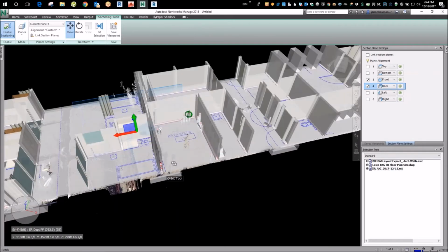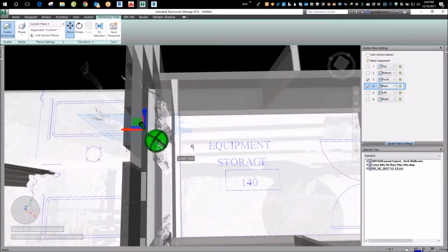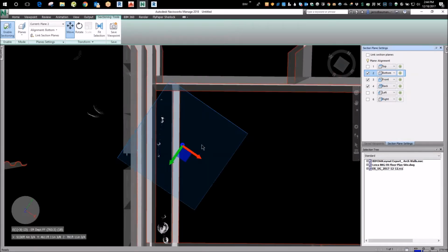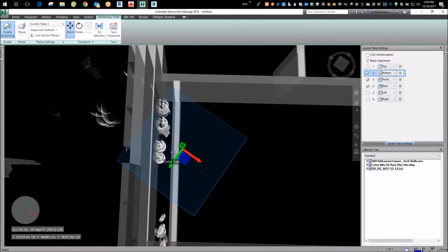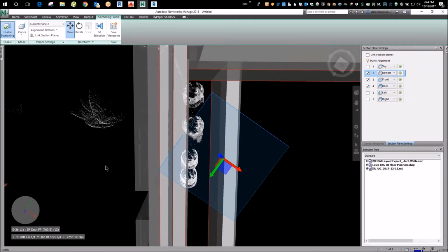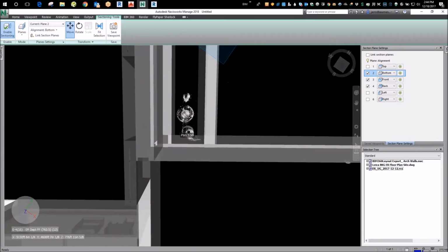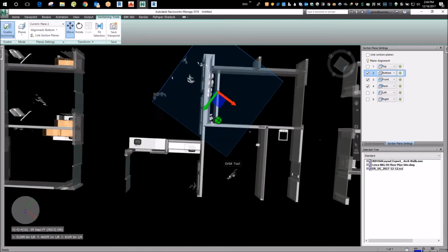What was the issue with those pipes in the wall? Right here. So if you expand it to the north, yeah. I mean, you tell me. Here, I'm going to bring up the bottom clip on this. I'm going to just cut out. You tell me what's wrong right there. Yeah. Got it. They're not in that chase. That's the spot they've got to hit. Notice the plumber, though. Notice where the plumber's at. Yeah, plumber's right in, because he's using a total station on good control. Yeah. So almost all his points were on.